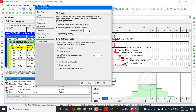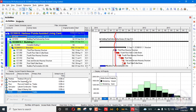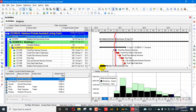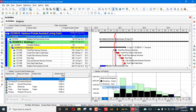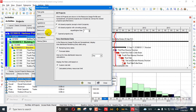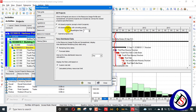Going back to user preferences, under resource analysis we select all closed projects except what-if projects, and you can see all projects displayed. The purpose of resource analysis is for comparing open and closed projects. There are three options: open projects only, all closed projects, and all closed projects except what-if projects.